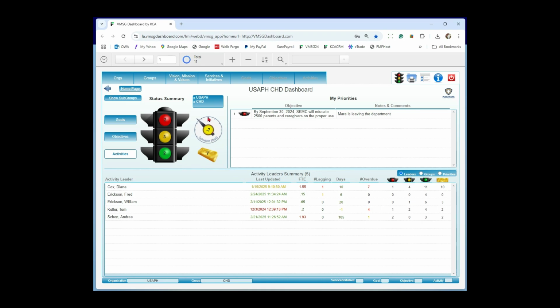Now, in addition to that, when we get on schedule, it turns green. So anything over to the right will be green. And you get down below that 60-day mark, 60 days below schedule, it turns red. So it's just a good snapshot. If you're 7 days behind schedule, you're not bad. I mean, if you talk about 14 activities, you could have one that's waiting on something and it's behind schedule or something. So probably not too bad. But this is where you look to start with your snapshot up here.